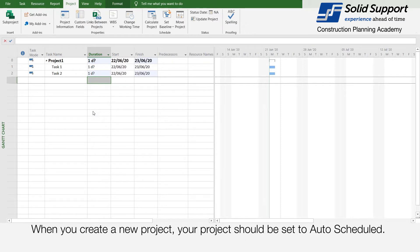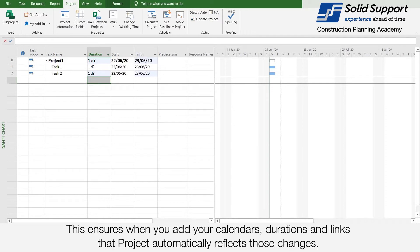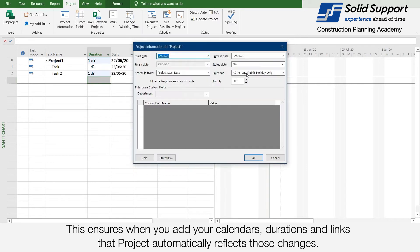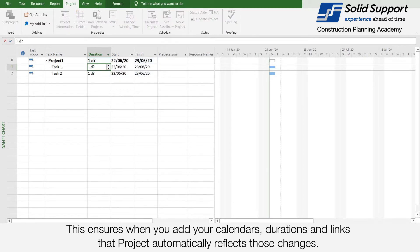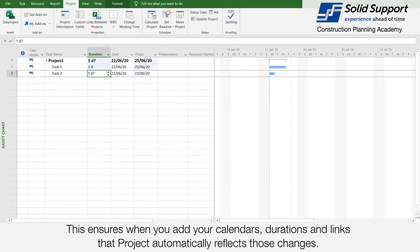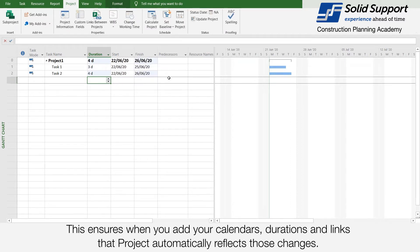When you create a new project, the project should be set to auto-schedule. This ensures that when you add your calendars, your durations, and links, that Project automatically reflects those changes.